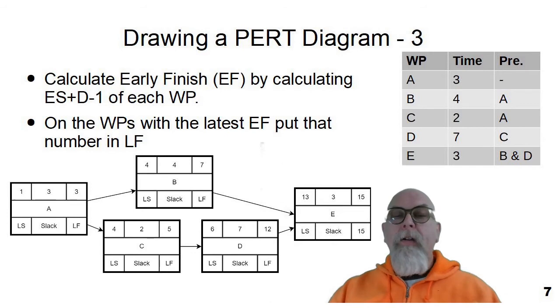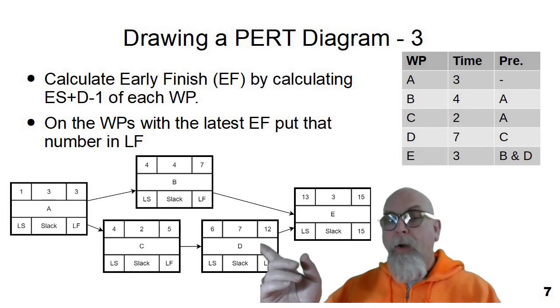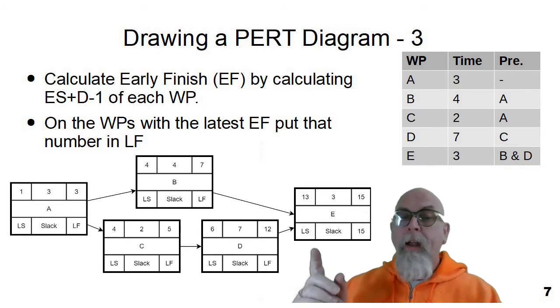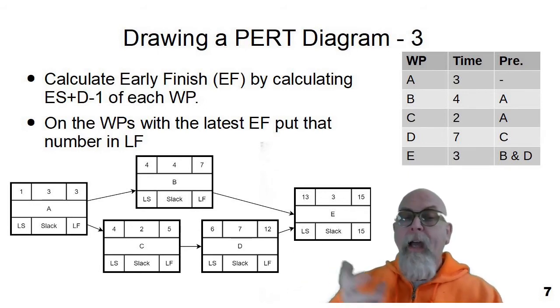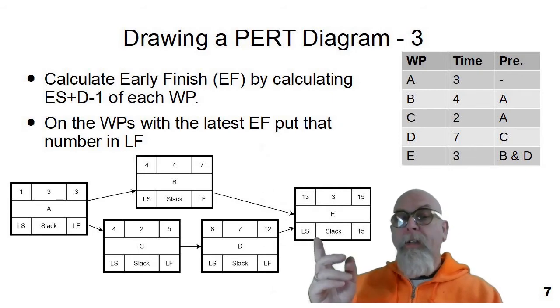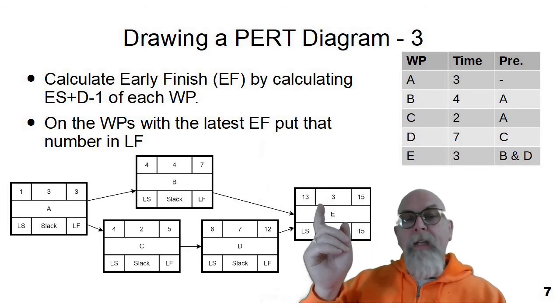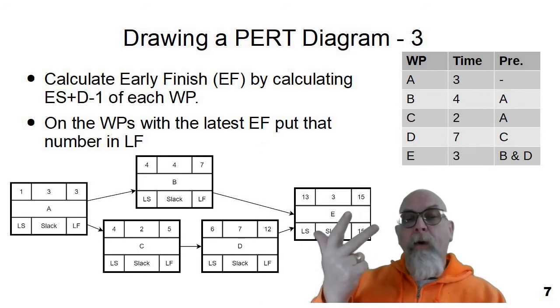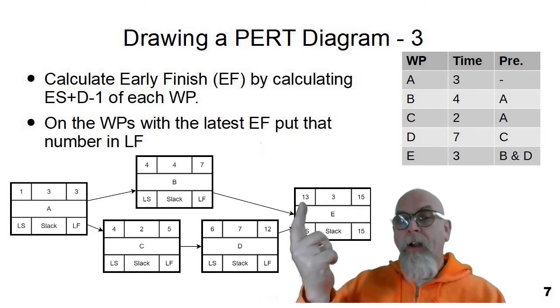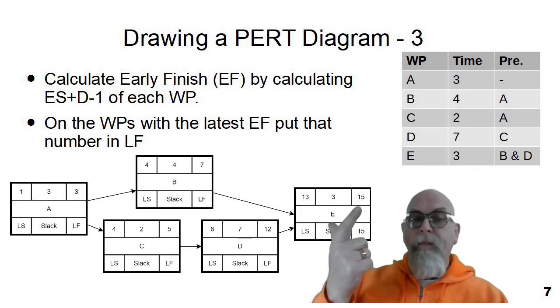Now that we've calculated early starts, let's calculate early finishes. We basically just go to each box and take the early start plus the duration minus one and write that as the early finish. I went through the whole network and just took this plus this minus one. We start on day thirteen, work on day thirteen, work on day fourteen, work on day fifteen. So we will finish it on day fifteen at the end of day fifteen.